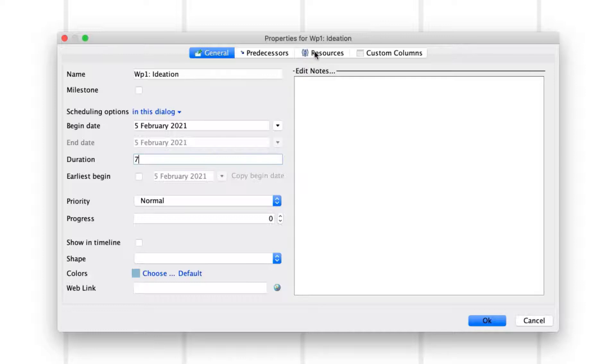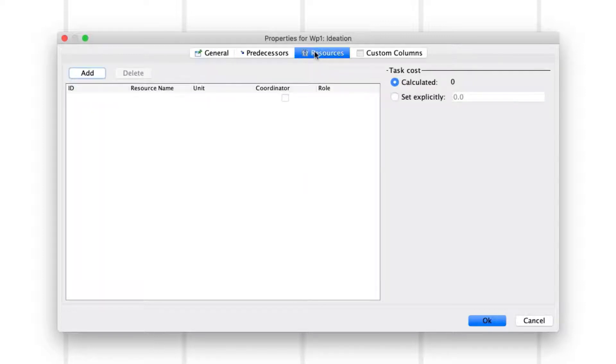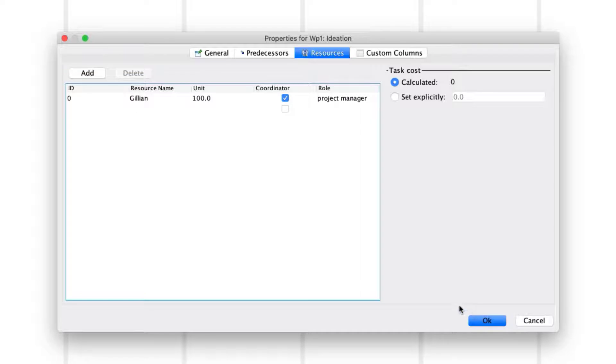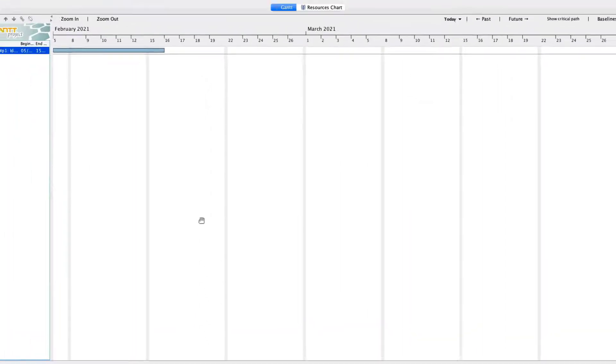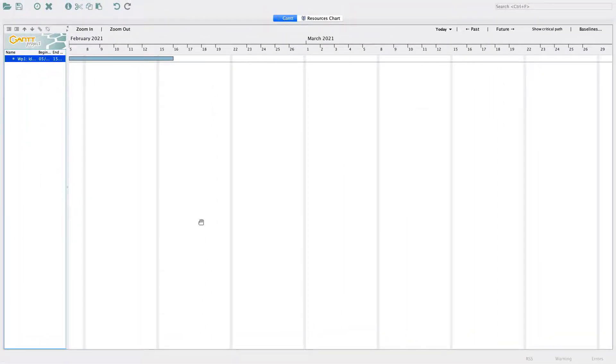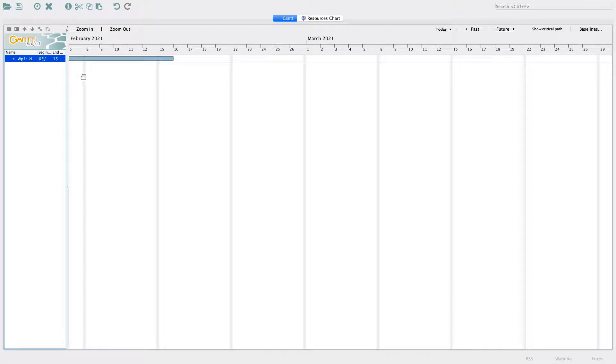Next, select the Resources tab of the Properties menu, click on Add, and add yourself as a resource. Click OK to close the Properties menu of Work Package 1 and return to the Gantt chart. A bar spanning 7 working days has now appeared on the timeline.